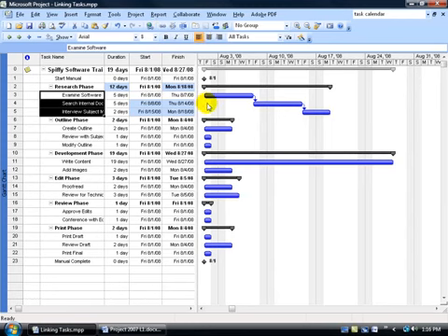And you'll notice, again, they're linked, but how are they linked? By that default relationship, finish to start, meaning that the predecessor, this task right here, must finish before this task can start. And then looking at this task, its predecessor must finish before this task can start. So you're looking at completing that task, then you can go to the next one, then you can go to the next one. Now, combining those from its earliest starting date, which is August 1st,